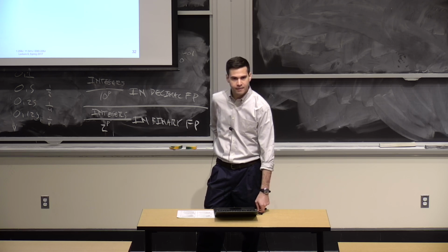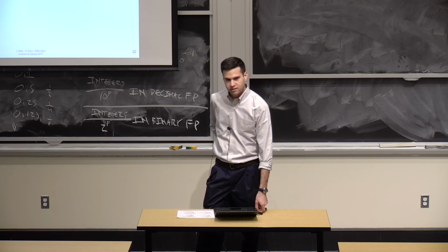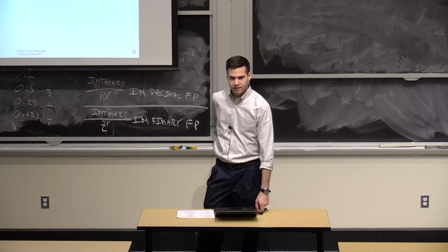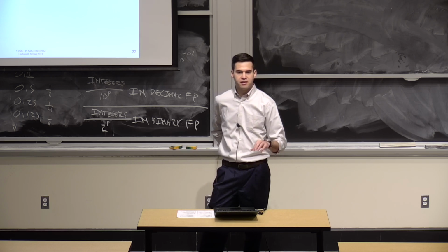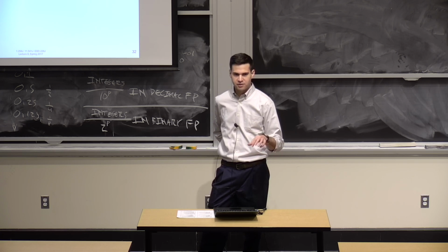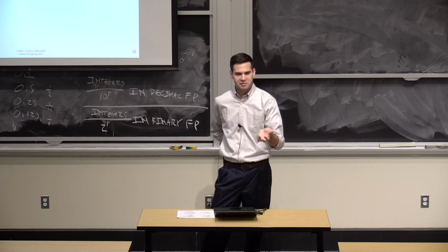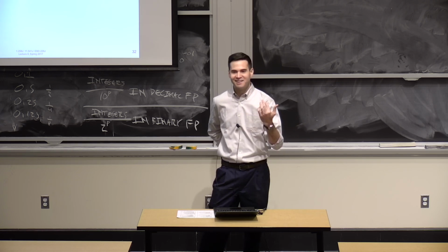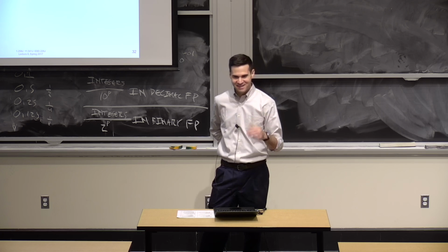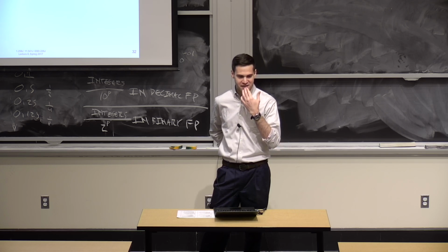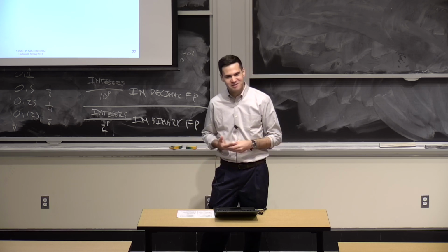Isn't there generally pretty bad follow-up though when these demand models are done? Yes, that's true. Usually once you do a study, you predict the demand. If the project goes forward, nobody bothers to compare how far off it was. At least not formally. I'm sure people comment, "Gee, that was way off," or "That was great." But do we have documented studies showing how accurate these predictions were? I haven't really seen many of them.